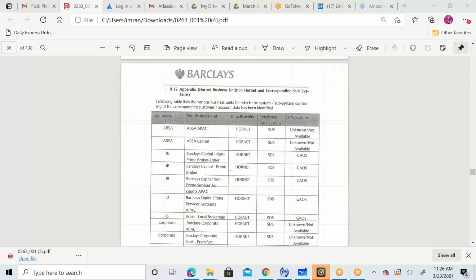Usually this document could be prepared in a cadence way, right? It's not like we have to plan or prepare it during the sprint planning. It's going to be an ongoing basis, but when you say sprint, when you say agile, you're not going to have an FRD. For an FRD, you definitely need 2-3 months to complete this document. And once this document is completely done, approved and signed off, only then can you start your first development. You cannot move an inch without this document.